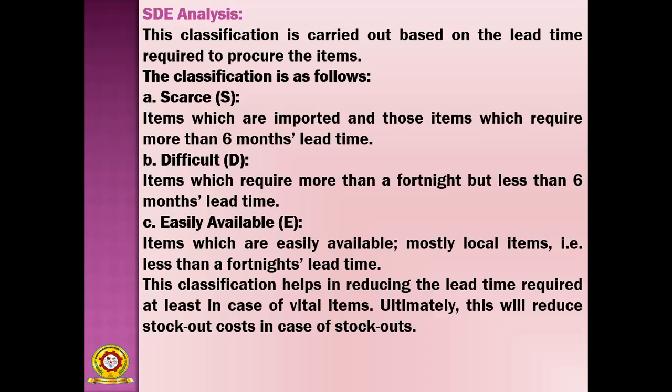That is very, very important. Once again I am repeating: lead time means the time between when you place the order and when you receive the stock. There is a gap between these two things, the days in between, and that is called lead time. Depending upon this lead time, you have to categorize into three types. That is SDE analysis.